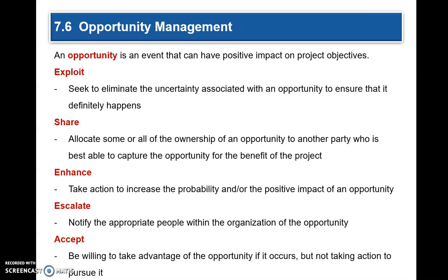As far as opportunity management is concerned, an opportunity is an event that can have positive impact on project objectives. You can seek to eliminate the uncertainty associated with an opportunity, and that is by exploiting it. You can allocate some or all of the ownership of an opportunity to another party who can capture that opportunity. That is sharing. You can take actions to increase the probability or positive impact of an opportunity. That means you're enhancing it.